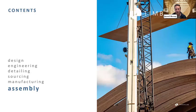It's taking what's traditionally been an industry that has a design that gets worked out during construction with a series of RFIs and questions, and most likely delays and cost increases because of the unknown that you don't have in a design that way. But when you design a mass timber building, you have to figure out every inch or even fractions of the inches of a building prior to any manufacturing starts. And that, if done, can make the assembly process a breeze. That's when the project team can sit back and watch what's really artwork. It's the assembly of this beautiful structure just come together.